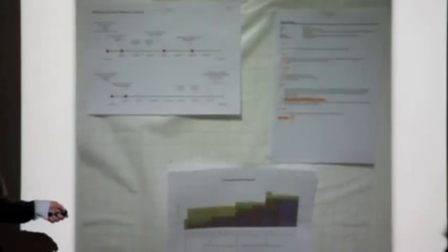We used Excel. One of the things I said I was going to talk about was tools to help Scrum or help your process. We used a spreadsheet, a very basic one, but I think you should use something like Excel just to collect these sorts of stats. Put everything else up on the wall, even your whole backlog. Make one of these story maps so you have a two-dimensional backlog and stick it all up. And if things start to fall off, just don't even pick them up, let them be sucked up by a vacuum cleaner because they probably weren't that important.